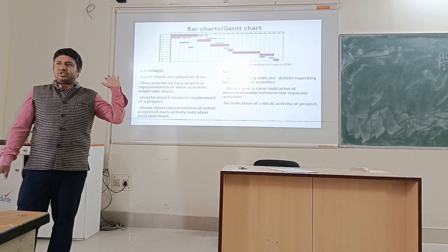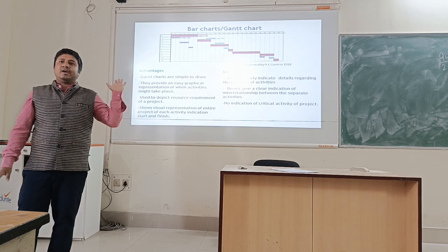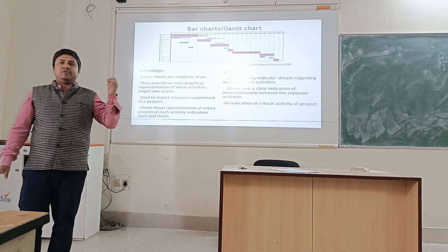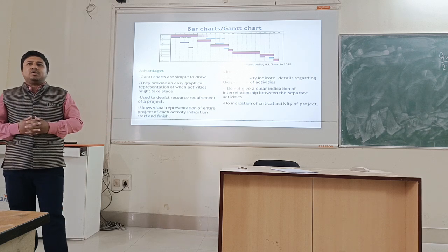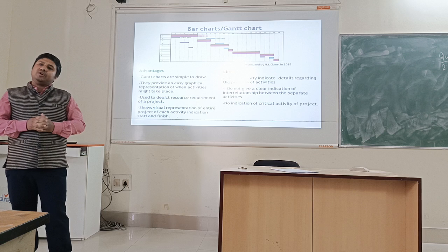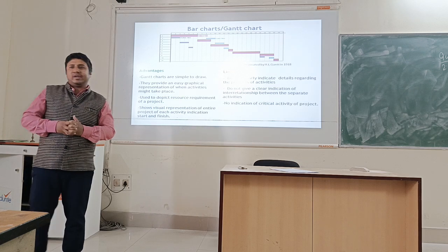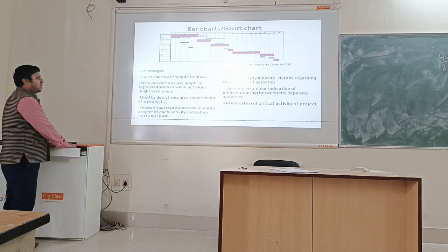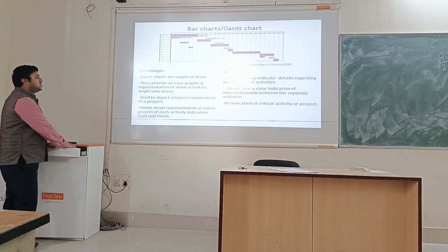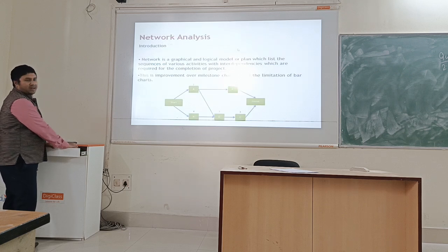We can use this visual representation. It can be prepared very easily, even by a non-skilled person. But to prepare a network chart, you will require a skilled person. The interdependencies cannot be seen in the Gantt chart, so to overcome these limitations, we can go for network analysis.